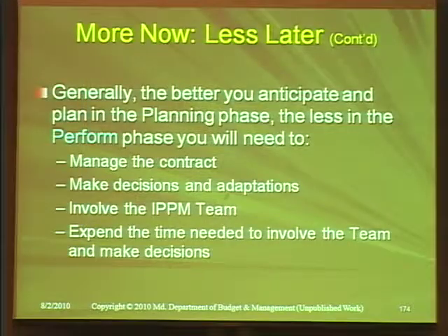Now moving into the perform stage. Again, the same concept. The better you anticipate and plan in the planning stage, the less in the perform phase you will need to manage the contract. If you have built good contract management tools in at the planning stage, so they're in your solicitation, which means they're in the contract, it makes it easier to manage. It's always harder to manage something that isn't structured to manage it.